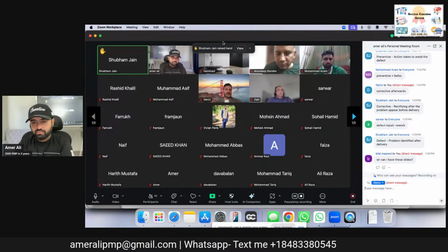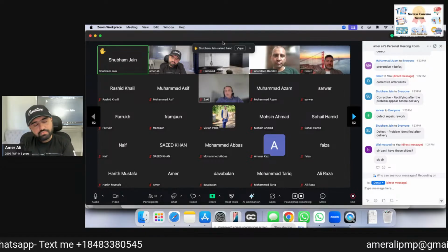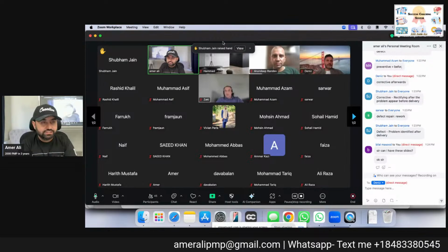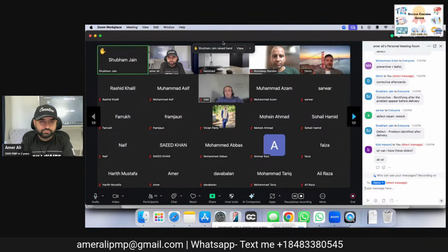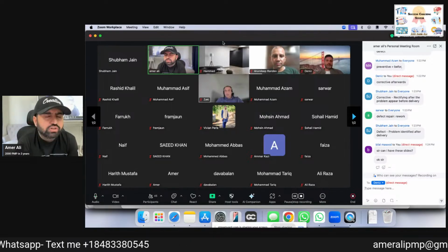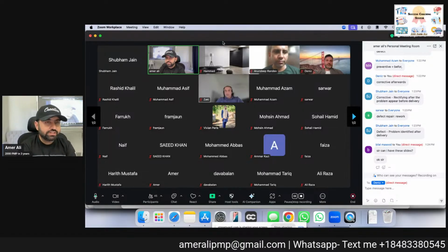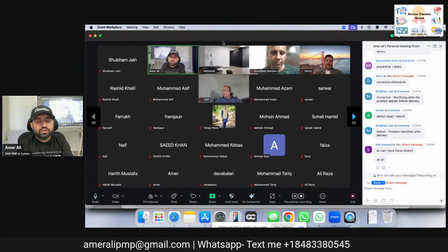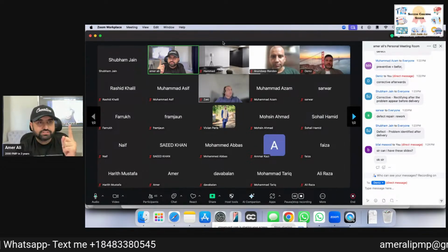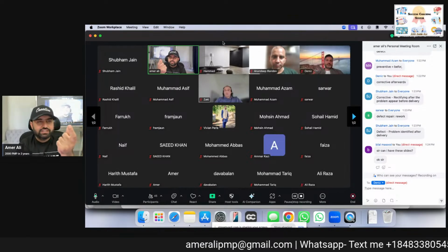One question I asked a couple of days back on WhatsApp also: whenever a change is required, do we first do the analysis, or do we first raise the change request? We first raise the change request. I have seen questions with a contradicting, very rare scenario, where you have to do the impact analysis first, for example when somebody did something without even asking, or it is immediate. As a general rule, 90% of the time you first raise the change request, then do the impact analysis. Only 10% of the time we do otherwise. That's a very rare scenario.